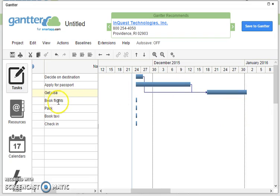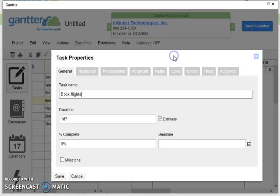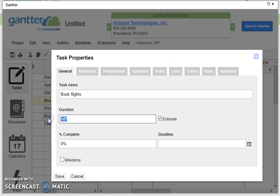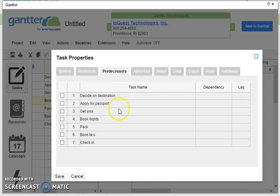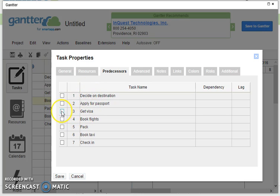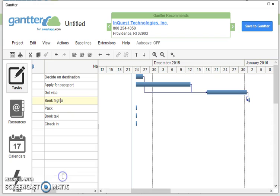Now once I've got my visa I can of course book my flights, and booking flights, well that's only going to take one day, so I'm going to click on 1D there, and of course it does depend on these things up here, but I know that once I've got my visa I can definitely book flights because the other things will have been done. There we are.